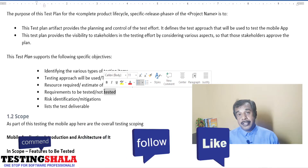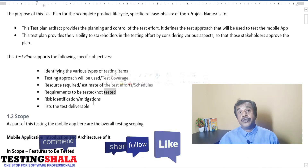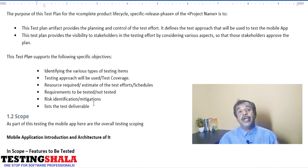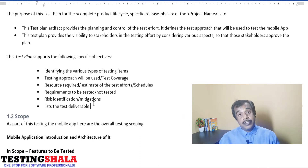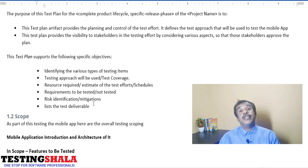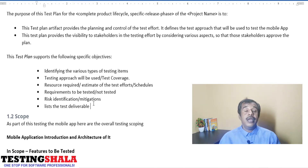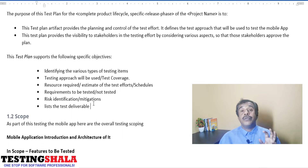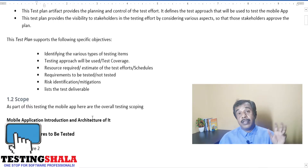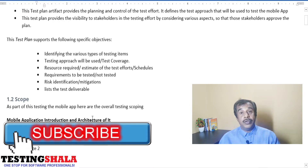If you have already identified any risks or assumptions made while deriving this test plan, you should call those out. During strategy estimation you might have taken many assumptions — those should be documented. For any identified risks, you should not just mention the risk names but also provide a necessary mitigation plan. You will also be documenting what test deliverables will come out of the overall testing project.